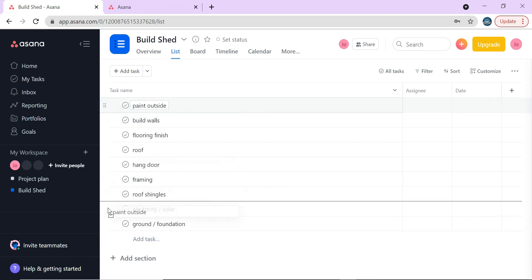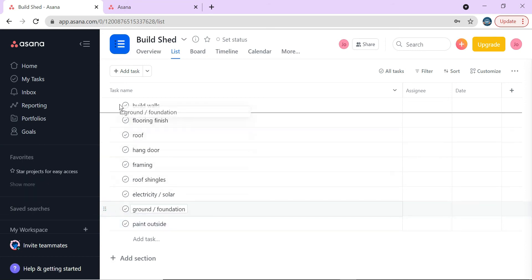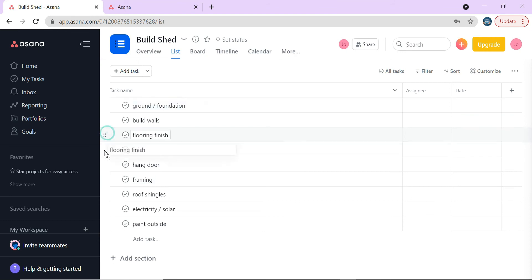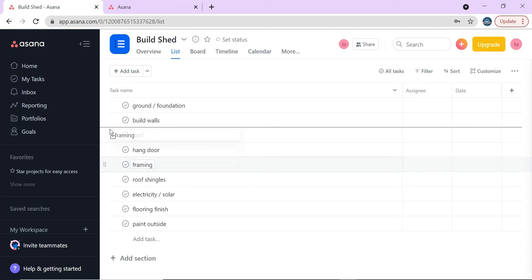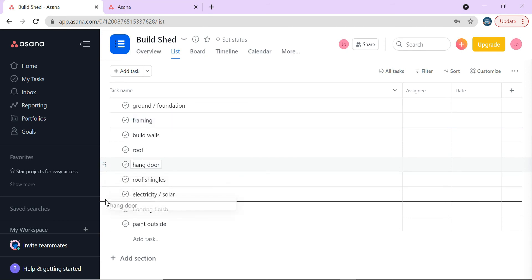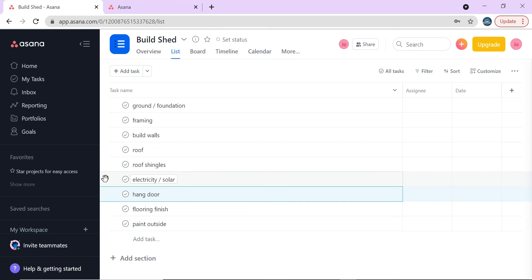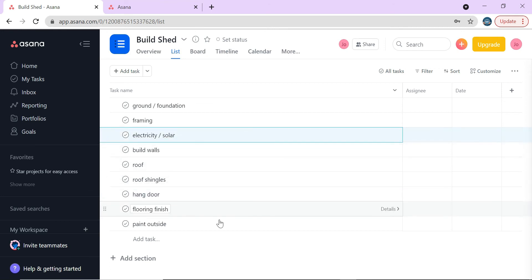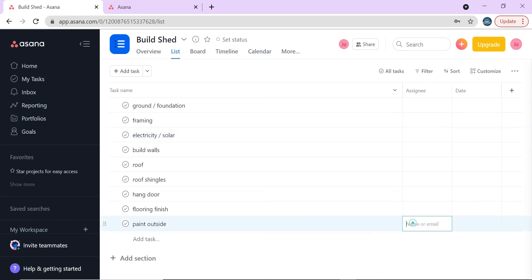Dragging and reordering: ground and foundation is first, then framing right after, then walls, roof, shingles, electricity, hang door towards the end, flooring towards the end, and paint outside closes out the project. We can also set dates and assign tasks. Since I only have one member I'll assign everything to Joe, but normally you'd have subject matter experts handling different parts of the project.